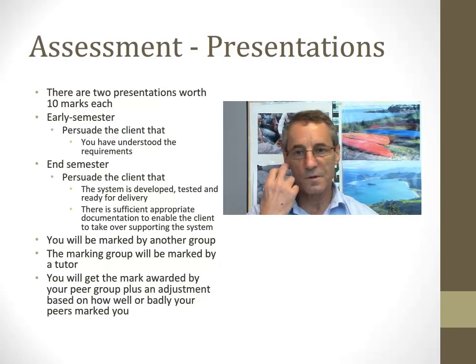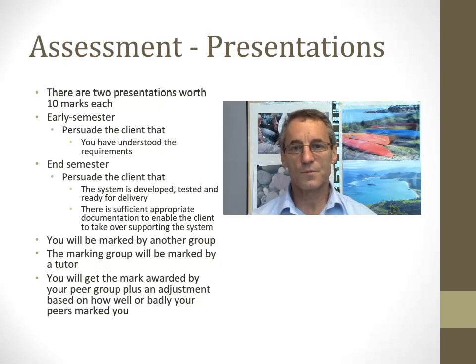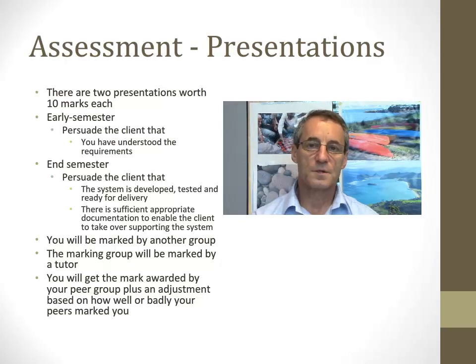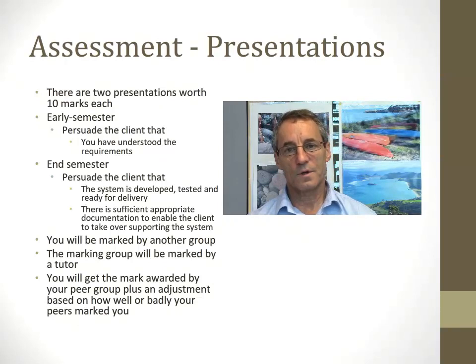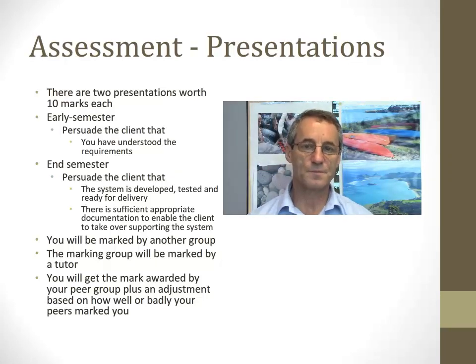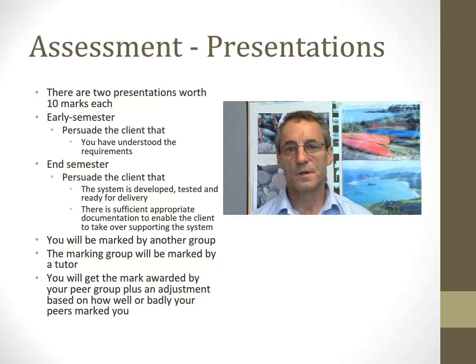And usually the things that show that something is ready for delivery is that the testing is done and the test results indicate the product is complete and is stable. And the second thing that's necessary for delivery is that the product can be installed, used and supported. And that means that all of the documentation for all those things is ready and able to be done. So that's the second presentation.